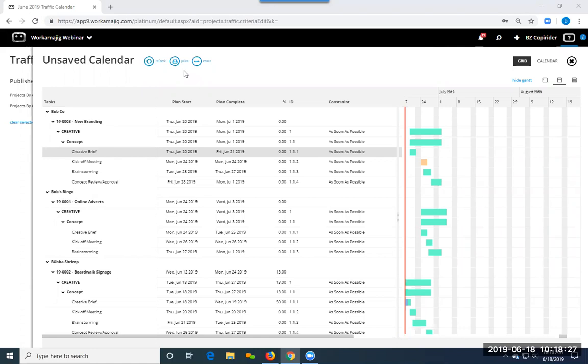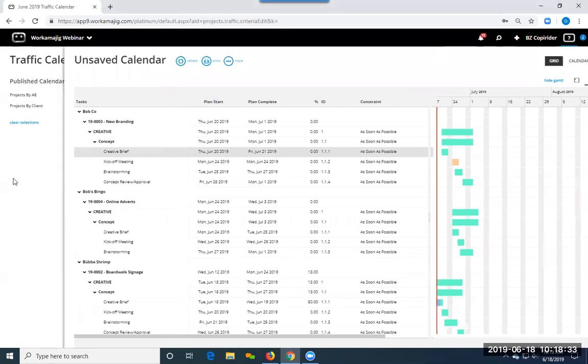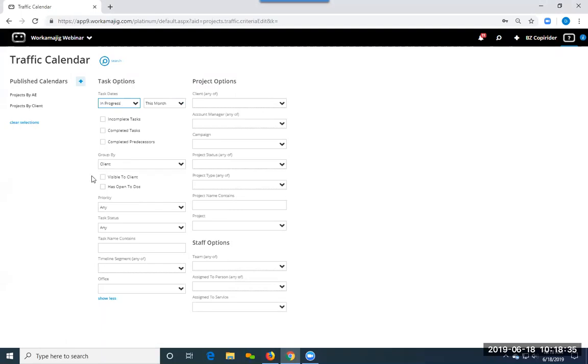Okay, we need to be able to report on past due tasks. And again, that was my do but not done list. Unfortunately, I think I switched some filters on that particular one. The do but not done is looking at tasks that have either started or were supposed to start on or before today. That would be my do but not done. But you just need to sort that. So that would be available under the assignments.